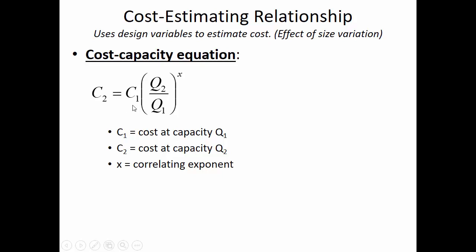But because of the non-linearity, meaning that sometimes you get a discount for buying a lot, but sometimes actually it's more expensive the larger something becomes. Occasionally when you're building something really large, it increases the complexity, and it maybe costs more than twice as much to build, for instance, a building that's twice as tall. A skyscraper that's 100 stories has got to be a lot more sophisticated and strong than two 50-story skyscrapers.